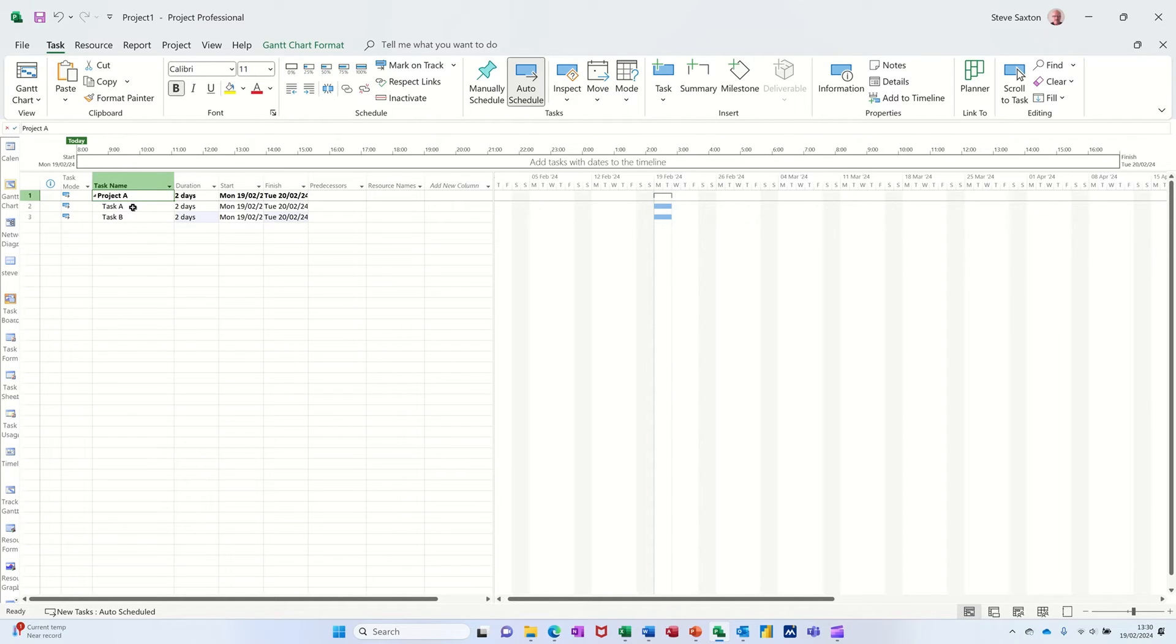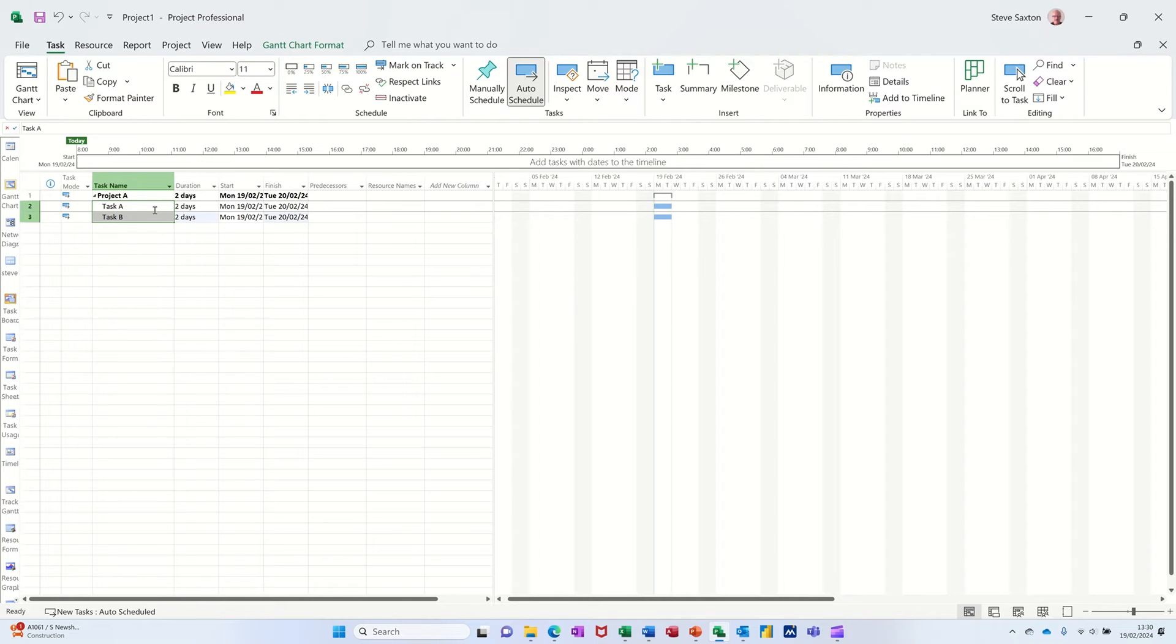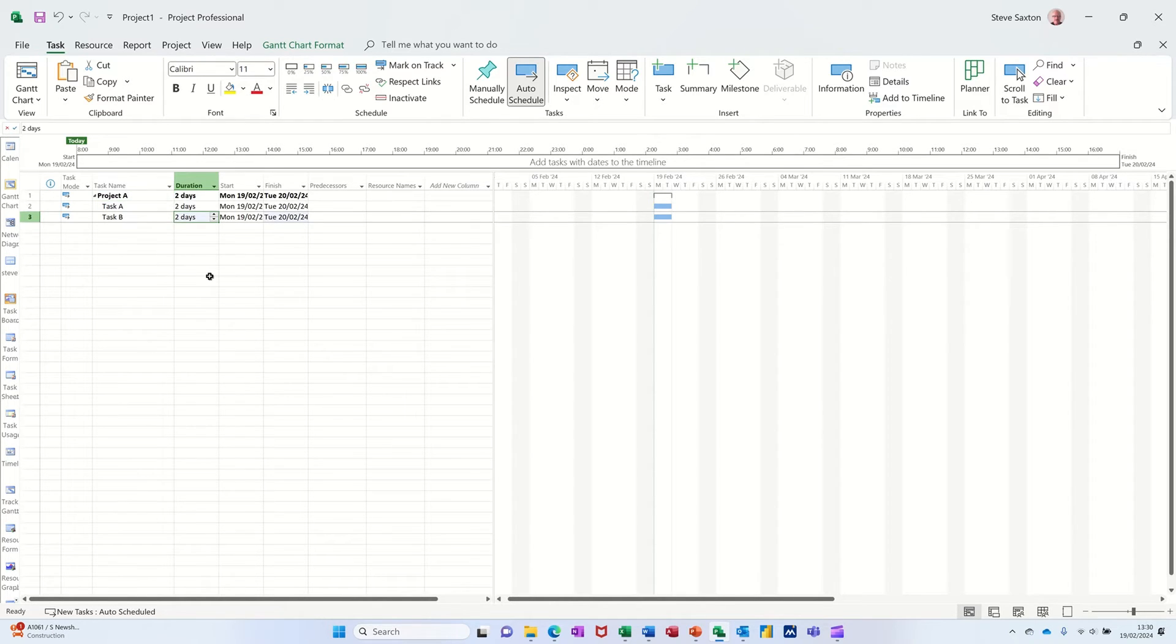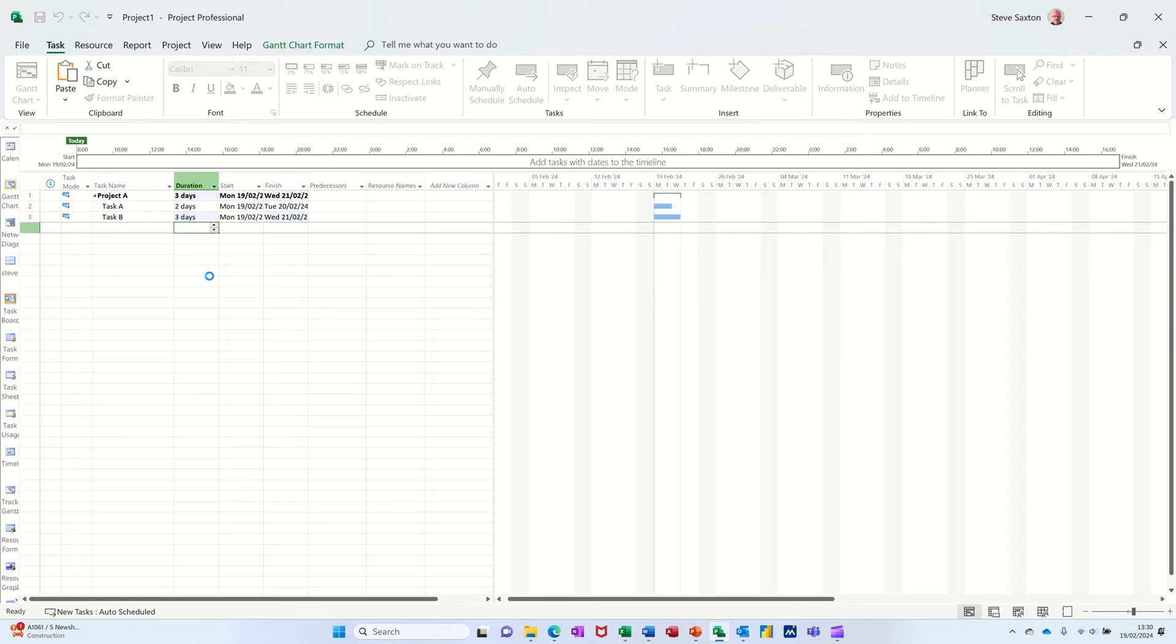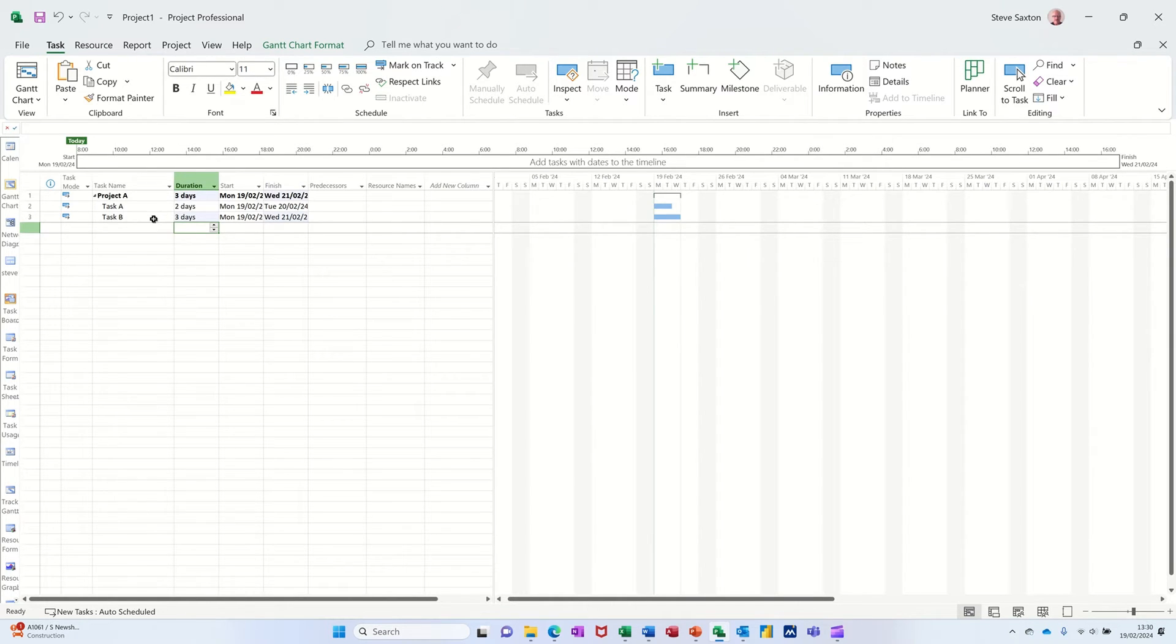Now if you create a summary task like I've done there, this summarizes the subtasks underneath it. So if I change that duration for example to three days, that's telling me that this project is lasting three days because that's the longest duration.